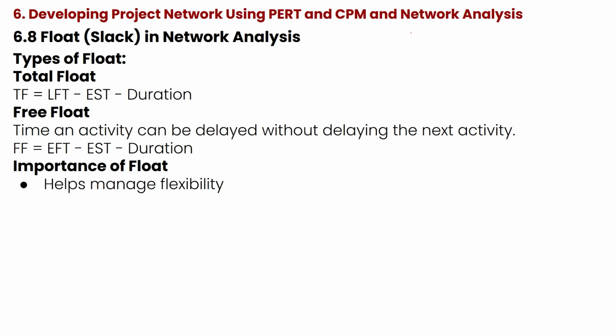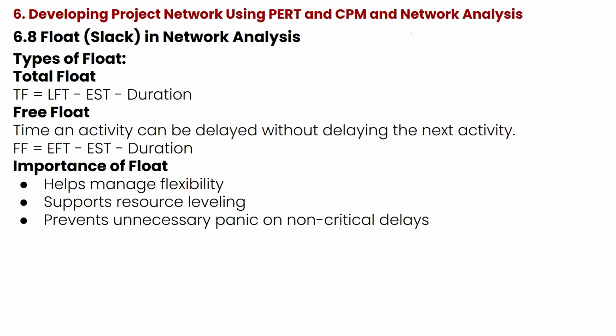The importance of float is that it helps to manage flexibility and supports resource leveling. It also prevents unnecessary panic over non-critical delays. Take for example, you're preparing for an exam as your project, and your exam kicks off on a Friday, and today is Monday.